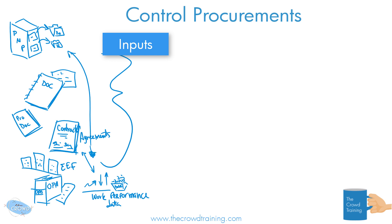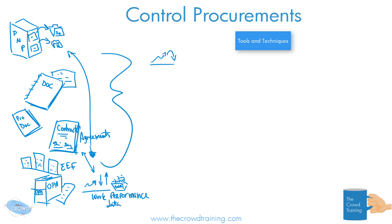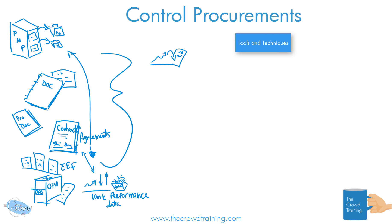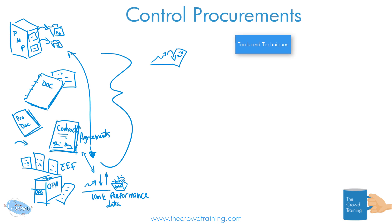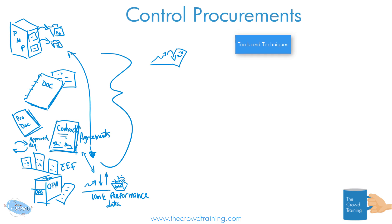We need to use that information to make sense of it — does it mean things are trending fine, or are things going to fall off a cliff and we have to maybe submit a change request? I also missed one more input: we might have changes that have come in. Make sure these are the approved change requests, not just any change requests.